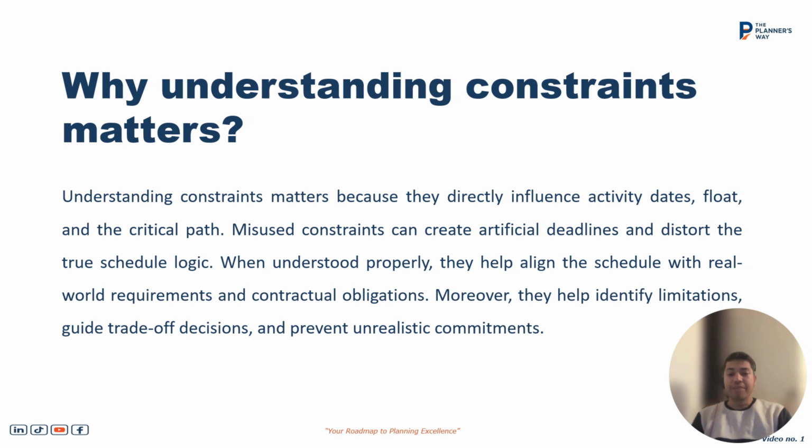Any misused constraint can create an artificial deadline or distort the true logic, or the true picture, of the schedule that it is going to reflect. So we need to understand properly whether the constraint is replicating something in the real world scenario or not. In a project, we may need to deliver something at the end of the month, or there are contractual obligations, or end dates. If we want to replicate those dates, we need to put constraints on the schedule. As long as they replicate the real world situation, we need to introduce the constraint.